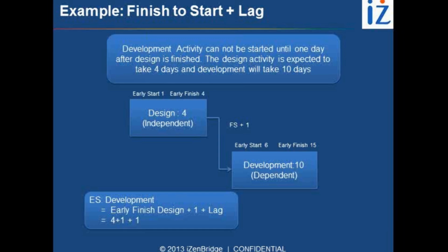So using lead and lag, the start time of the dependent activity can be visualized as the early finish of the independent activity plus 1 plus lag. So this is how we can think of lag.